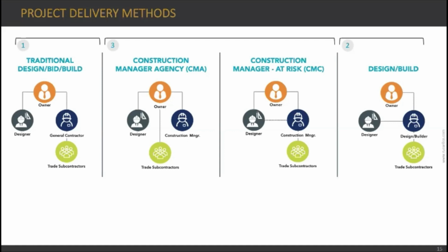Then in the third project delivery method, construction management, in the first model, the construction manager acts as an advisor for the owner from the beginning of the project. And this can provide lots of advantages to the owner and for the project success, because the construction manager knows all of the processes regarding the construction project. And when we consider that generally owners or investors for construction projects are not from the field and are not really familiar with construction processes, it can have lots of benefits to the owner and to the success of the project.